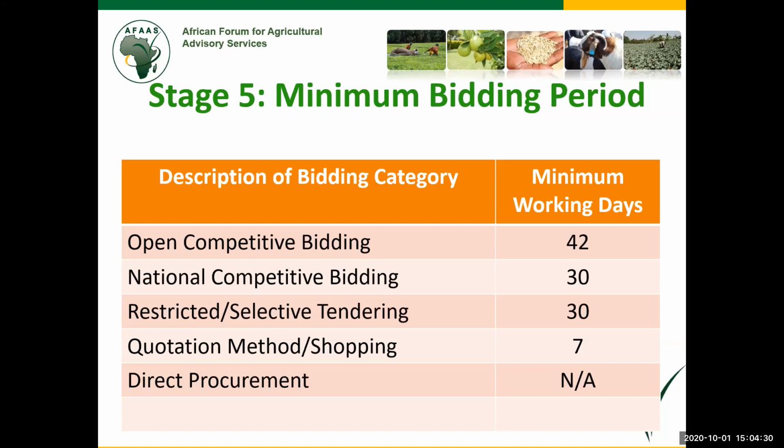However, the people who are in the management of the procurement function cannot participate because there will be a conflict of interest. Because we might see scenarios where country fora people are actually the ones doing it. So if you participate in developing the terms of reference, you participate in soliciting, you are not allowed to participate in the procurement itself, because you have a lot of information.